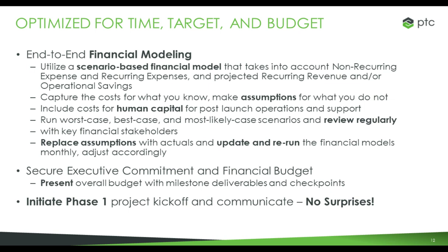Make sure you get human capital in there, both for during the project as well as for post-project support. A lot of times, especially if you're an analog company that's moving to digital, that's really shooting for moving to a product-as-a-service type of vision, you're going to have to know that moving into that recurring revenue stream is going to have a cost. It's also going to have new skill sets that are going to be added to your team, understanding what those roles are and how much they are from a salary perspective, from a benefits perspective. All that stuff should go in there.